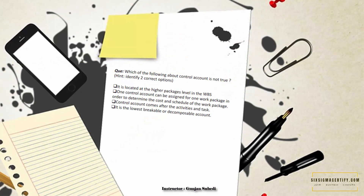Here is a question: which of the following about the control account is not true? Option one: it is located at the higher packages level in the WBS — this is true as seen in the figure. Option two: one control account can be assigned for one work package to determine cost and schedule — also true. Option three: the control account comes after activities and tasks, meaning it is the lowest decomposable level — this one is not correct.